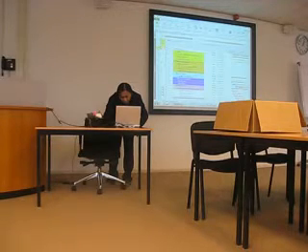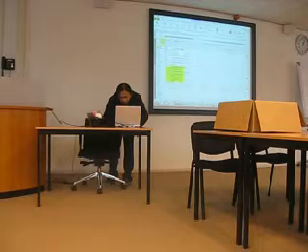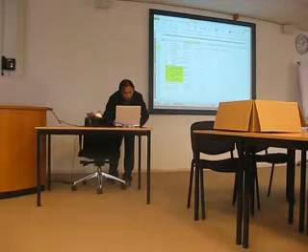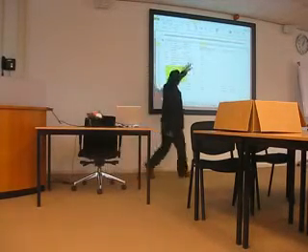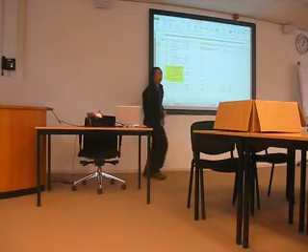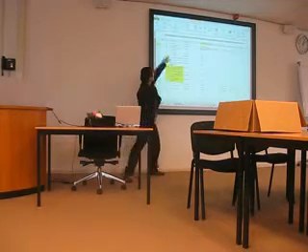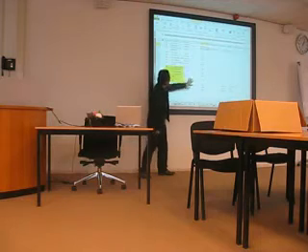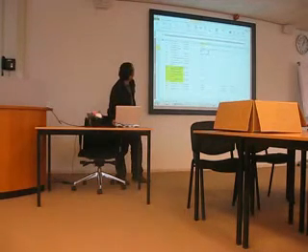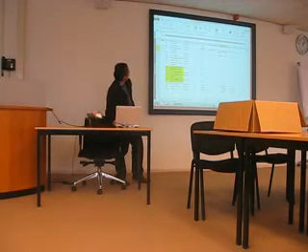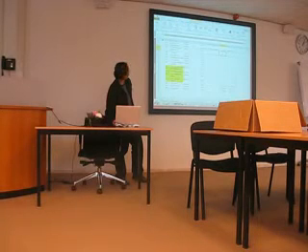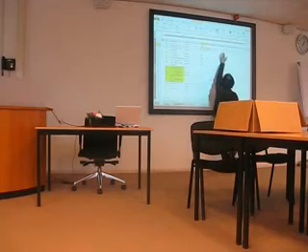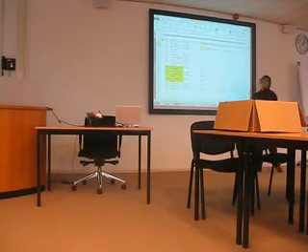This is the way to do that. But it is actually a trick, because the resource type is material, though reception is actually cost. If I use cost, I cannot play around with this column. That's why I choose the material type, so I can put the number here.